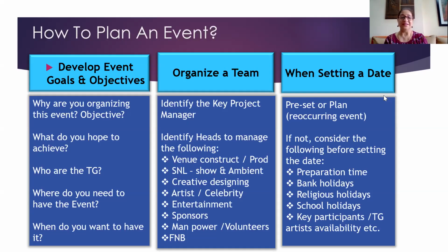When do you want to have it? Now, in this case, obviously it has to be during Navratra. Otherwise, if you're planning other things, then keep in mind, when you come to the third part, setting a date, that you're considering whether there are exams happening at that time. Do you have that much preparation time? Is it a bank holiday? Are there religious holidays? Will people go away? The long holidays, will there be people? People normally travel during those days, school holidays, etc. Your target group should be available at that time. So these are the questions you want to ask when you say, when do you want to do it?